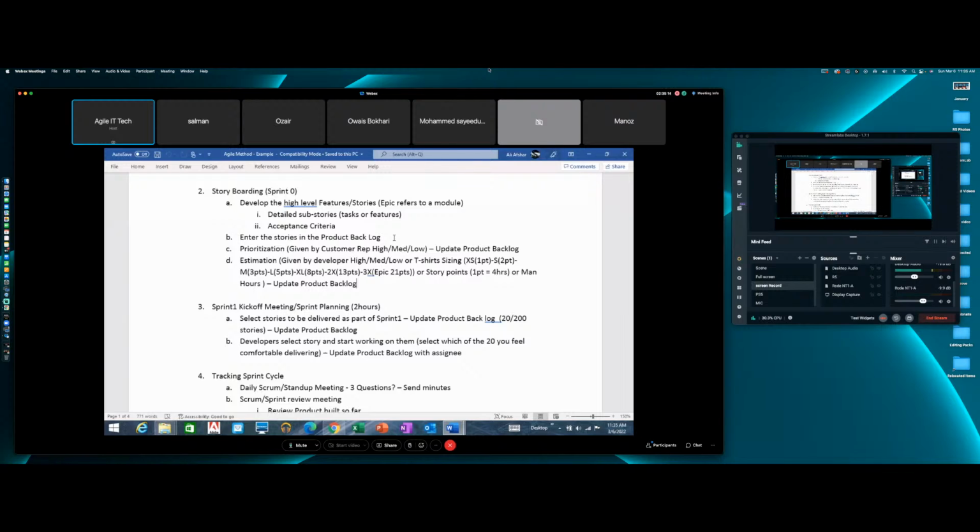But it took Sayyid 20 minutes to do the same task. So this is why they like to measure the effort in points, because when this 2-mile task was done by Sayyid, or by Ozair, or by the Olympic runner, the team would still gain 2 points. Yeah, 8 points. We'll consider this task an extra large task. You got it? So to keep it equal, they measure these things in points rather than the effort itself.